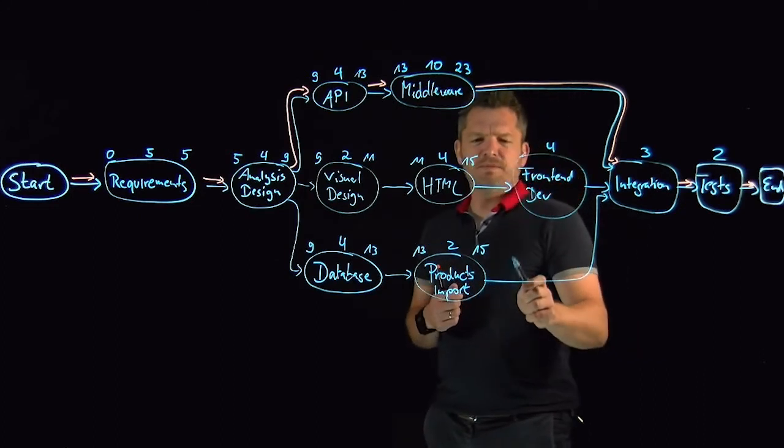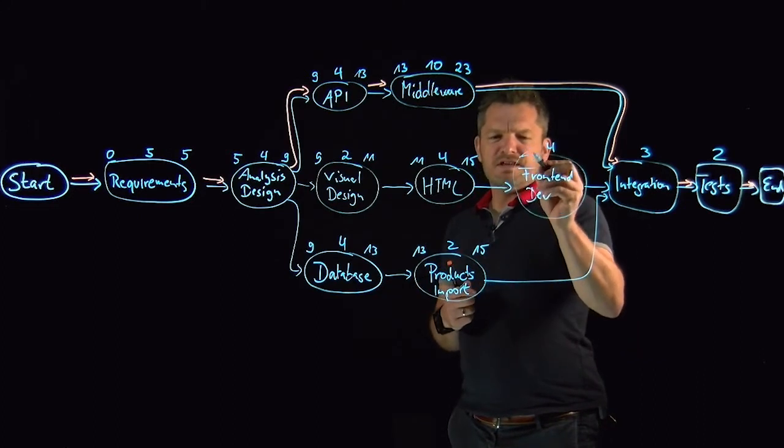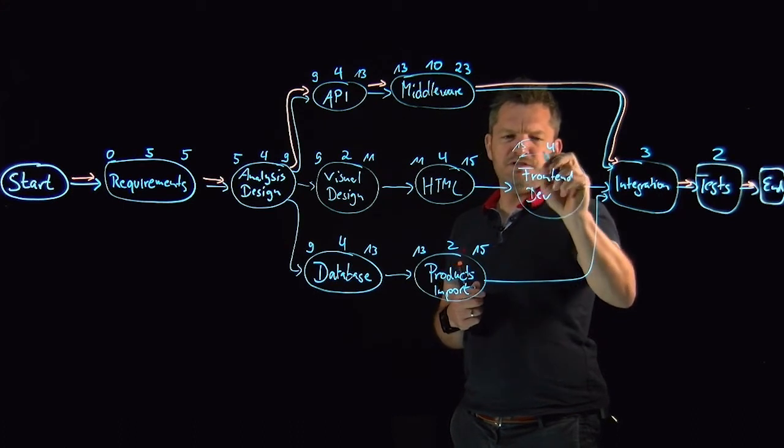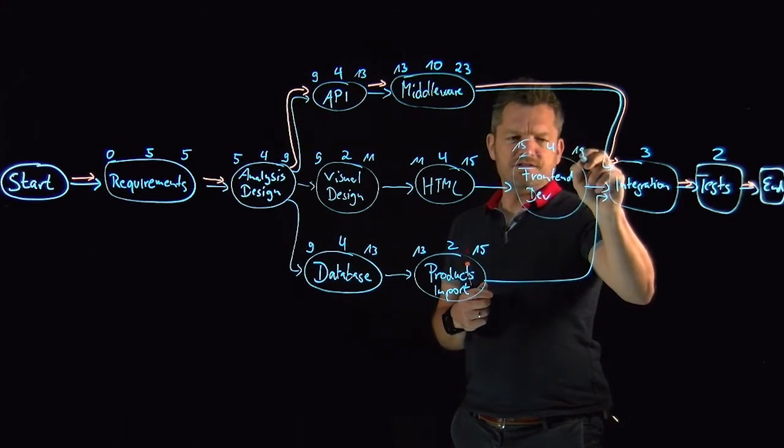And now you see the frontend depth is on the same path over here. We can take this number over. Fifteen plus four is nineteen.